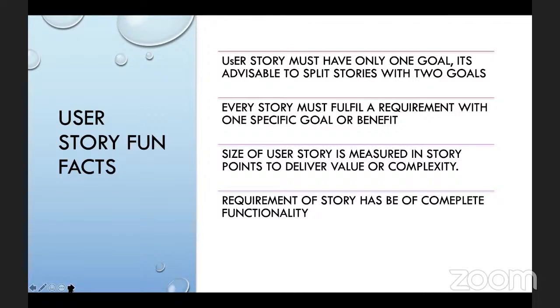Fun fact number 3, size of a user story is measured in story points to deliver value or complexity. So as you're writing your story, we will size the story. I think yesterday I started talking about sizing, and we will get into sizing proper, right? So the size of the user story, we measure stories in points. Yesterday I started calling out the sprint velocity. We talk about the sprint velocity. We talk about a little bit on grooming and the stories that you bring up for grooming that we need to estimate. So stories, we size them.